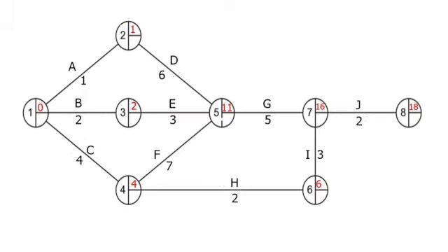We know that we've reached the final node at 18 weeks. So the EST is 18, but there's obviously no other activities to have been completed. So therefore the latest finishing time will again obviously be 18. So we can work backwards from this point. So if we go back to node 7, we do 18 minus 2, we'll get 16. Now again, 16 and 16, if we finish on 16 and carry out activity J, which is 2 weeks, we'll get to 18, so it hasn't been delayed. So that's absolutely fine.